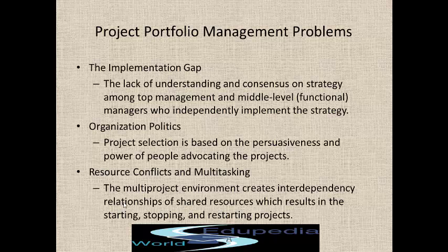The senior management is not able to explain why a particular project is selected, and why another project is not getting selected. This can be avoided if there is a transparent mechanism of project selection, wherein a set of criteria is given and each project is rated based on certain weightages, and then the project gets selected based on the weightage.